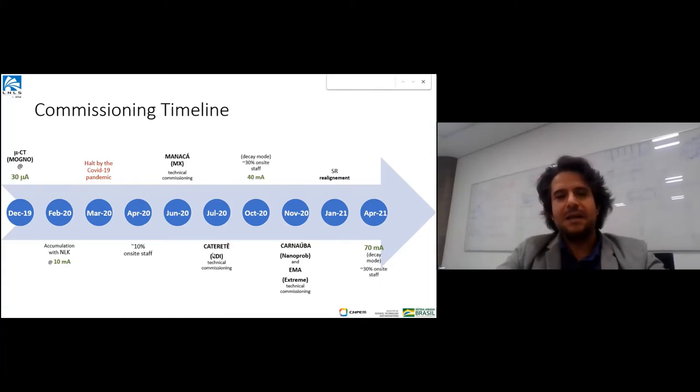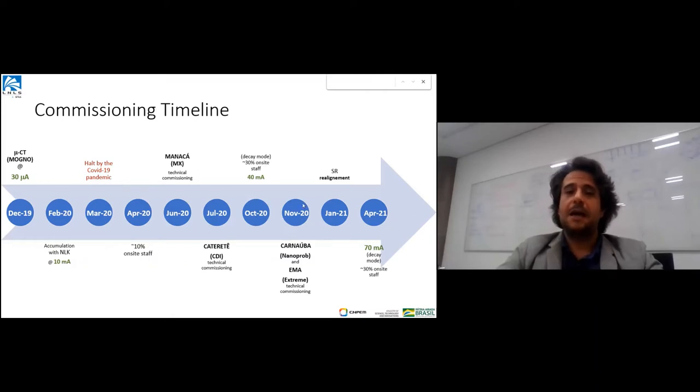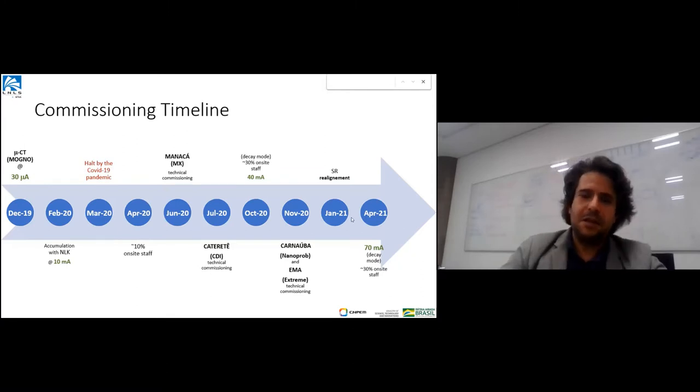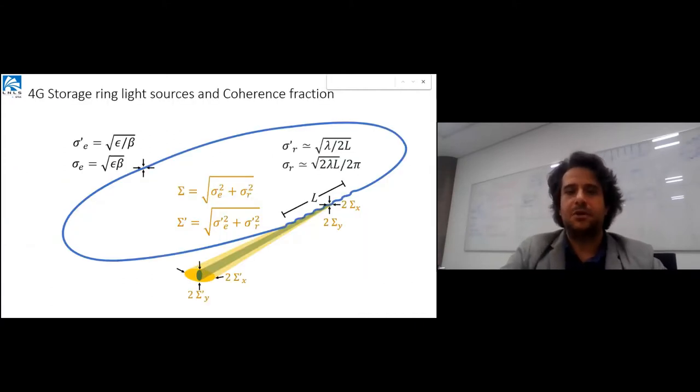By July 2020, we had the first technical commissioning of the coherent diffraction imaging beamline. Since then, we've been ramping up the current and starting new technical commissioning of beamlines. Beginning of this year, we had a major realignment, and now we expect to work with 100 milliamps and start user commissioning.